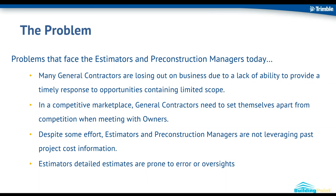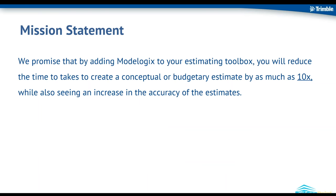And then lastly, kind of our benchmarking use case. The final GMP estimate that's communicated to an owner - what kind of checks and balances are being put in place to make sure that that number is solid and things aren't being overlooked? You can benchmark your final detailed estimate against past projects of similar scope. So what can we kind of promise from what will the product deliver to you as an end customer? I put on here 10x, but it's a real number. So we've seen many customers kind of revolutionize their conceptual estimating process with this tool.